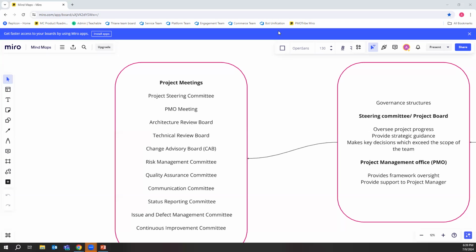For me, one answer, not the only thing, is to find that balance. And let me tell you what I'm doing now in that situation. When we go through quarterly planning, that is a very good way of meeting them halfway. As opposed to planning sprint by sprint, let's create a bit of a runway of milestones that we want to achieve either month by month or quarter by quarter. We tweak the plans and roadmaps that we develop over a quarterly period, and how we want to increment or iterate our product, and share that information as a milestone for them. So they understand it that way. We look at the product roadmap, and then change the information and present it in a different way that's palatable for them, but we're still giving them the same thing.